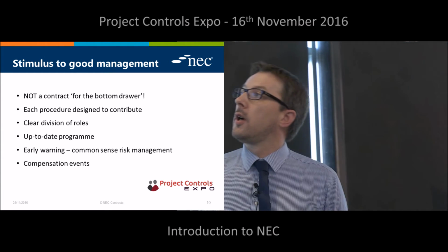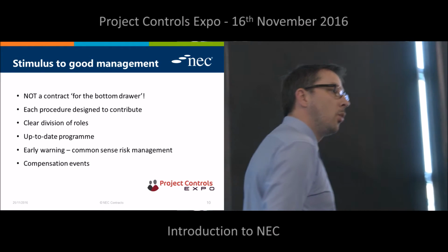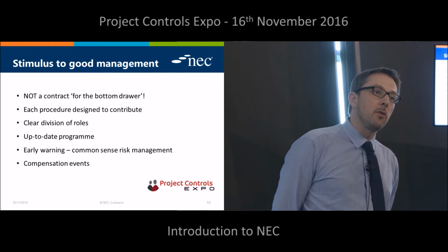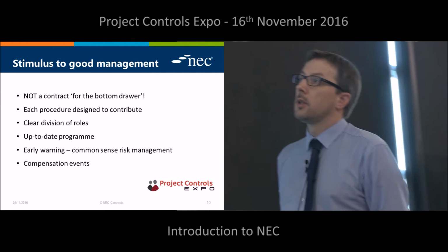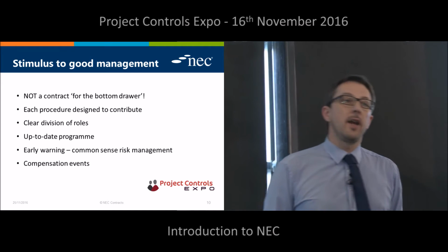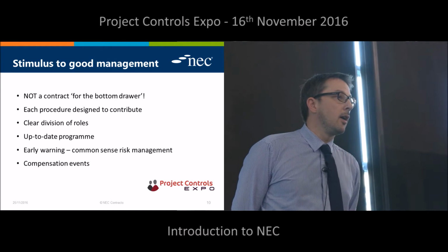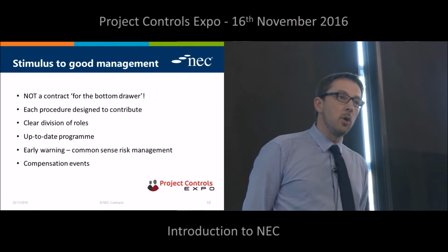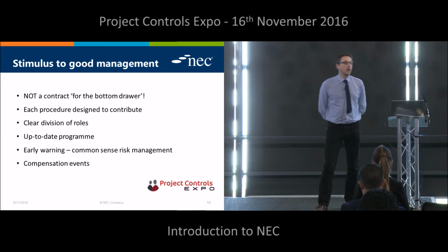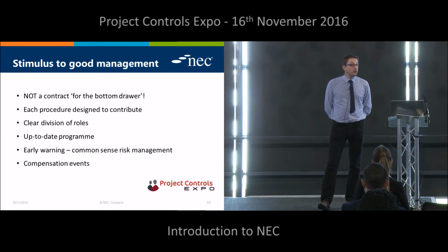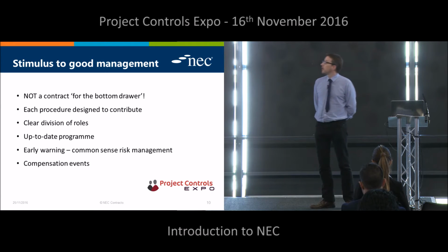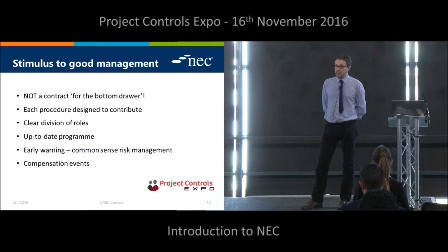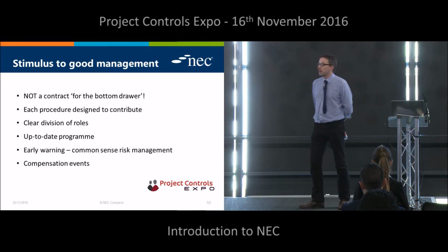There is also an early warning process in the contract, which is all about risk management, and it's a contractual obligation on both parties to give early warning of any matters that are likely to cause a problem, whether it's a delay in completing the works or services, or an increase in cost, or a quality issue that impacts upon the use of whatever it is being procured, whether it's works or a service.